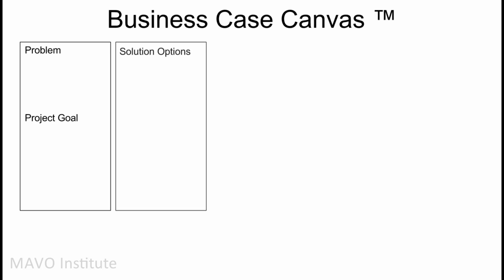Next, include solution options or alternatives. For the implementation of a social media collaboration platform, we looked at different vendor solutions, including Jive, Yammer, SharePoint. Preliminary analysis indicated that Jive may be best aligned to meet our requirements. I recommend that you have a supplemental document that includes a detailed analysis for potential options. You can define requirements or criteria that you use to evaluate each option, or keep it simple and just assess pros and cons for each option.